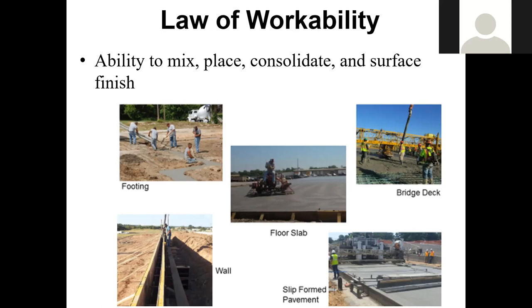We talk about ordering concrete. And I've seen where they start backing up, because I think it's like 1 hour, 2 hours, they start sending them back. Yeah, and that depends on what's going on. You actually have 90 minutes, and then you have to reject that concrete. So there's a lot of problems. And I'll talk about pre-meetings and how important pre-pour meetings are.